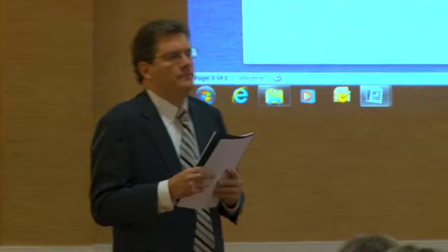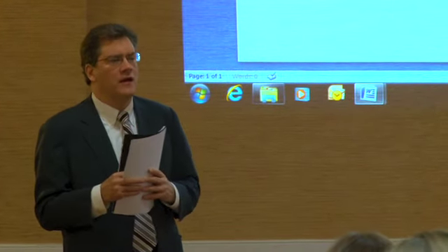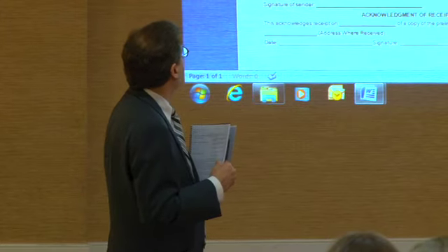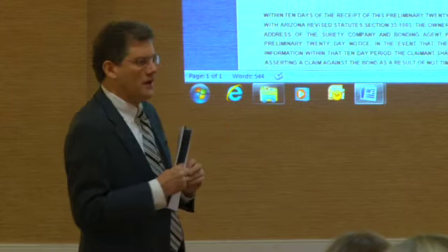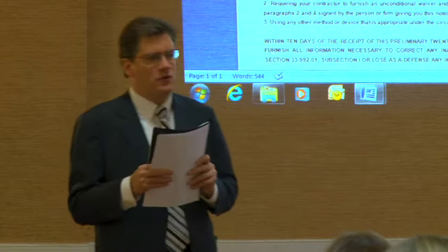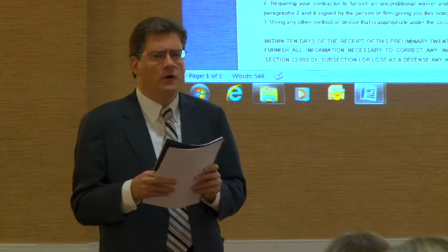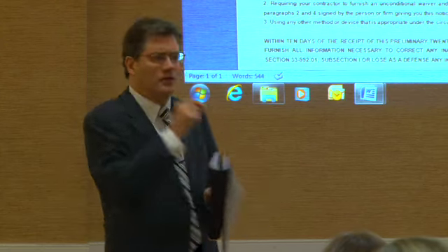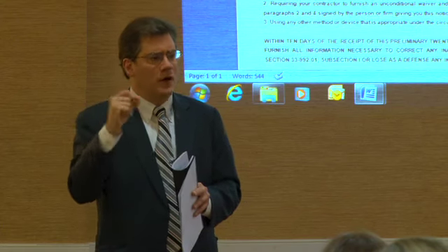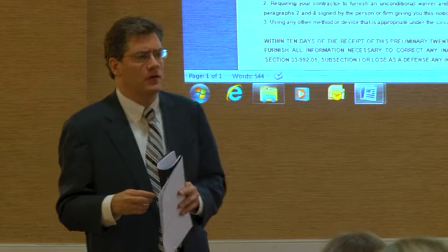Yes, ma'am. Is there any particular way that they're supposed to furnish you with the information to correct inaccuracies? I mean, what if they just call you up and say, oh, no, this is this? If they can verify that they corrected the information, that's sufficient. They can call you up and tell you that. Most of the time, what you'll see, if they're actually correcting it, is they'll change it right on the preliminary notice and they'll mail it back to you, sometimes by certified mail return receipt.